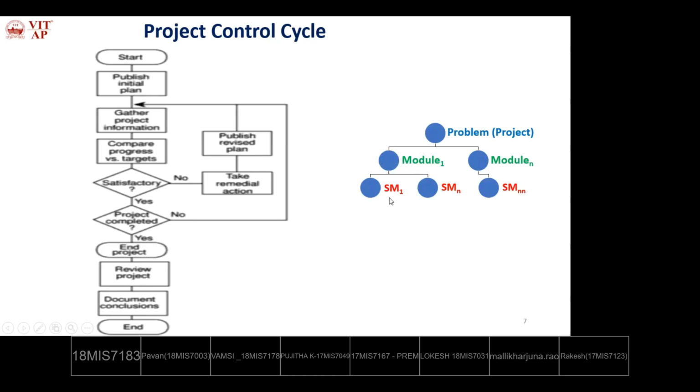These are what are called critical activities. Plan an alternate solution for this kind of scenario, publish the revised alternate plan, get approval from the client and management, and continue the process cyclically. If it is satisfied, all are working and finishing according to the schedule.